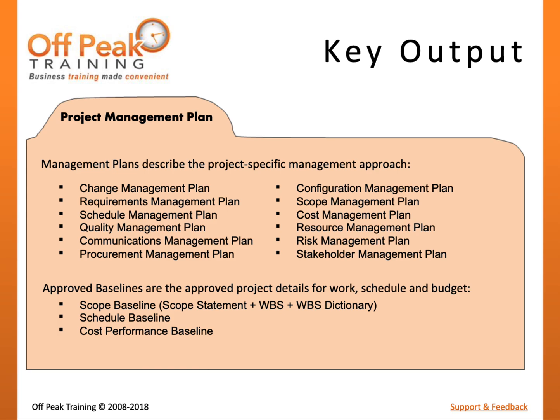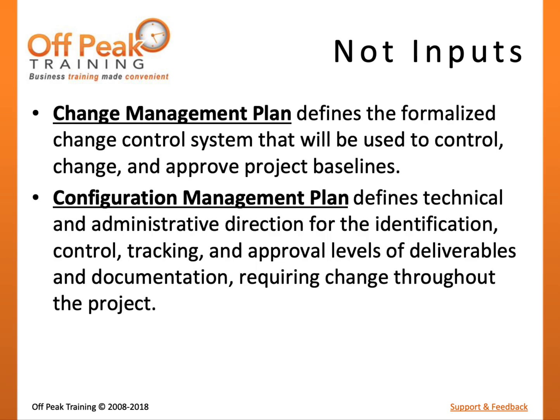There are 2 subsidiary plans that are not developed in any other process. Therefore, it is implied that they are developed within the Develop Project Management Plan process, the Change Management Plan and the Configuration Management Plan. Since they will not be developed in later processes, let's define the Change and Configuration Management Plans. The Change Management Plan establishes how the project baselines will be approved, controlled, and updated.